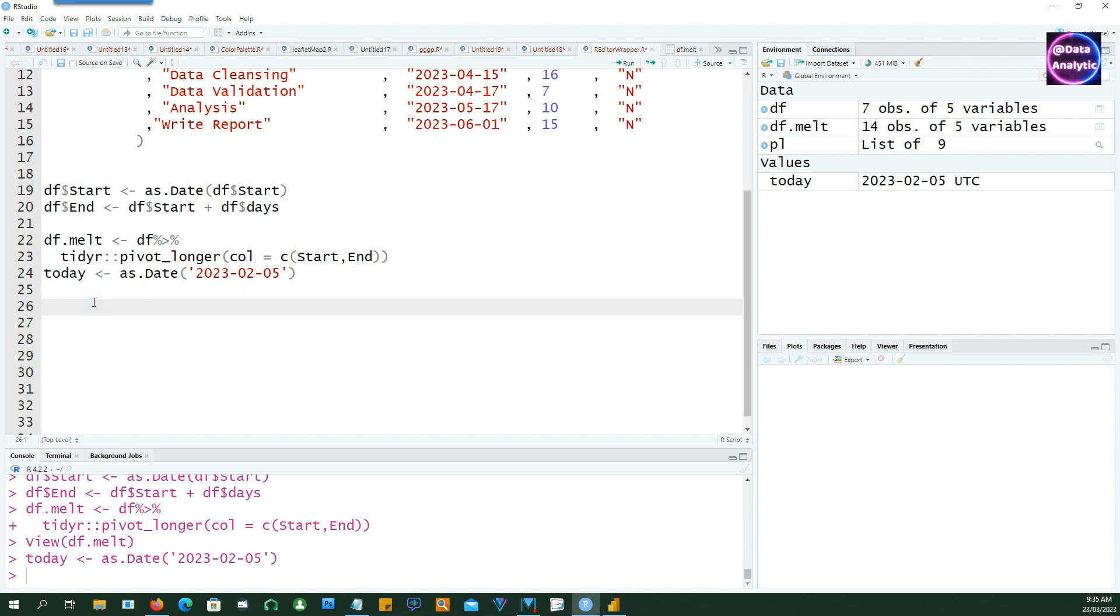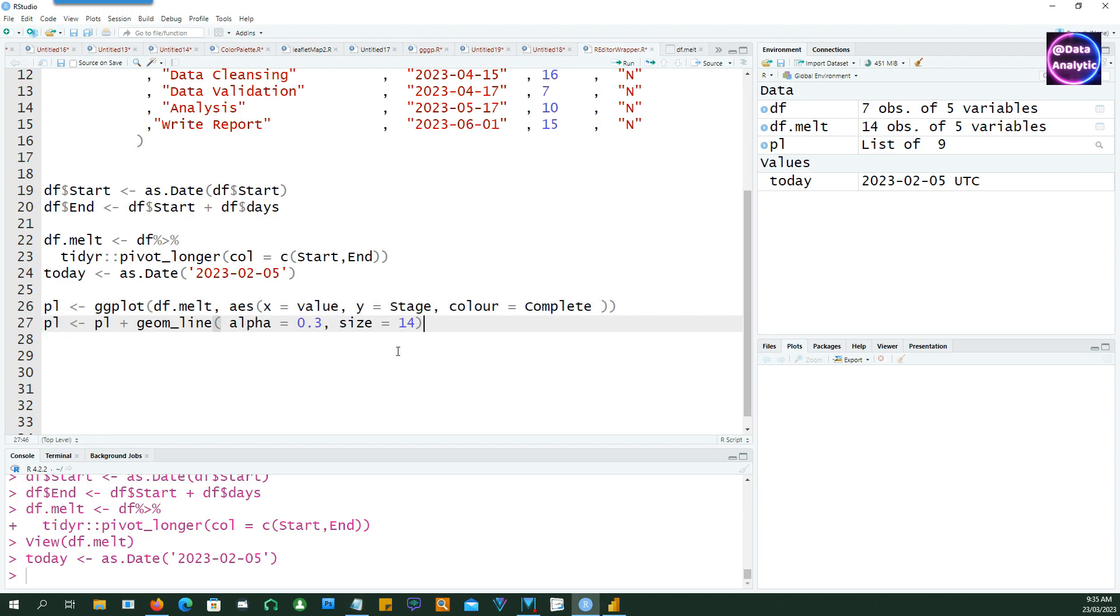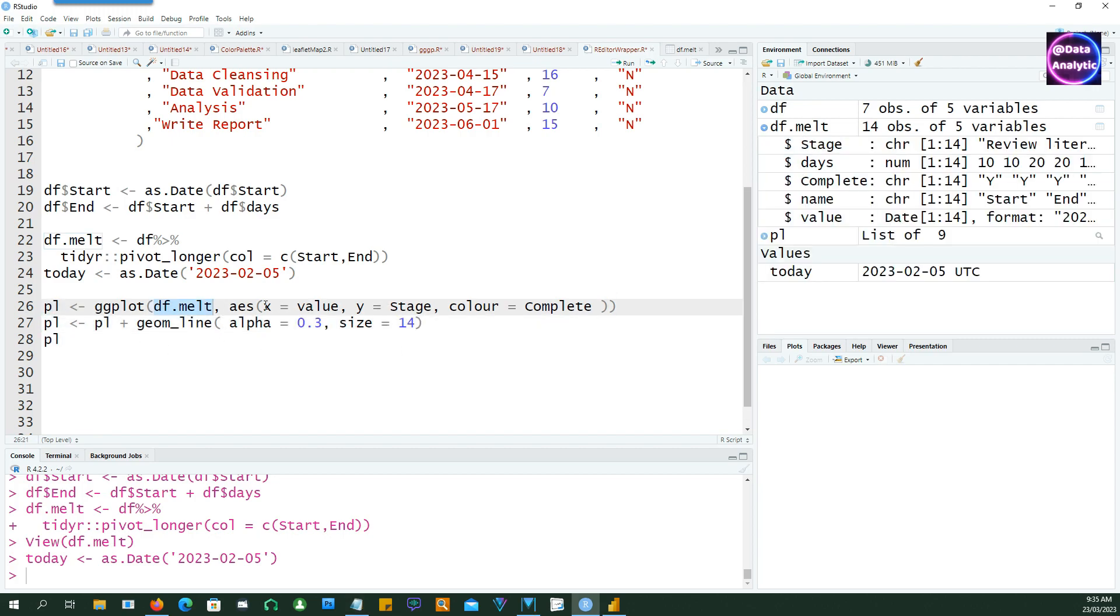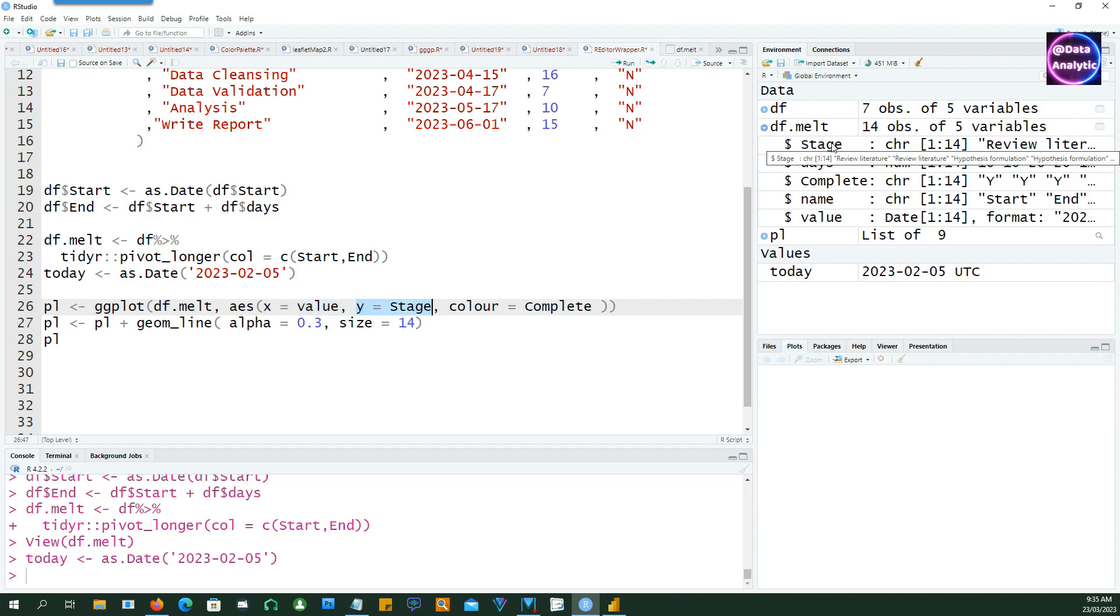Now let's create our first ggplot chart. So I'm using df.melt as the data and we have supplied the x value and the y value and also the color and it's going to be a geom_line chart. And the x would be the value from my data set which is the start and the end dates, and stage is the y value. Stage is the name of each work item and the color is coming from the complete column which indicates yes or no whether the item has been completed or not.